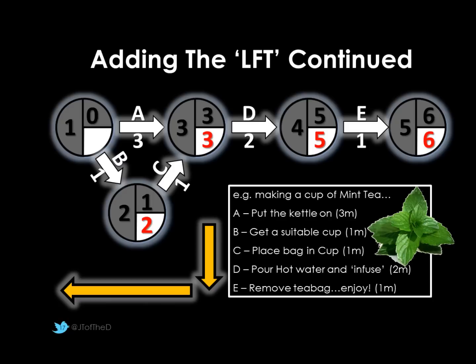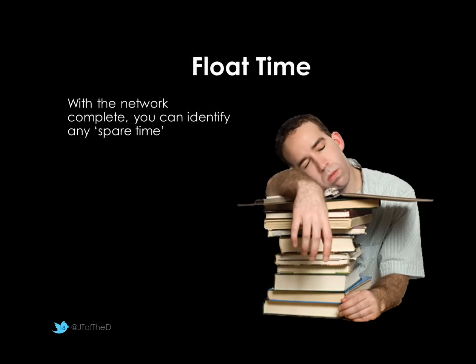So how will that look? Well, very simply, 3 minus 3 is 0, 2 minus 1 is 1, the lowest figure is of course 0. And it is a general rule with critical path analysis that the very first node will be node 1 with an earliest start time and a latest finish time of 0, 0. So that's great, we've got our network together.